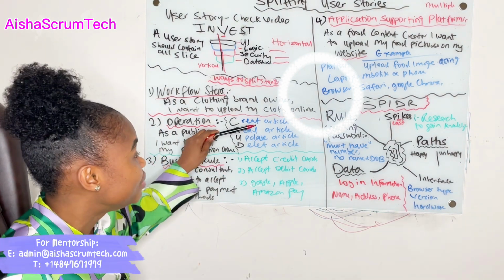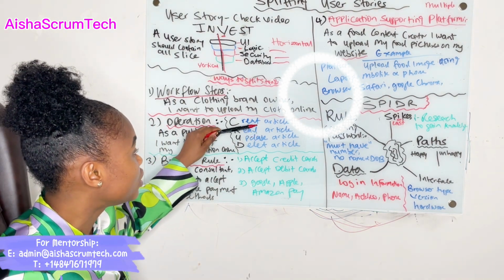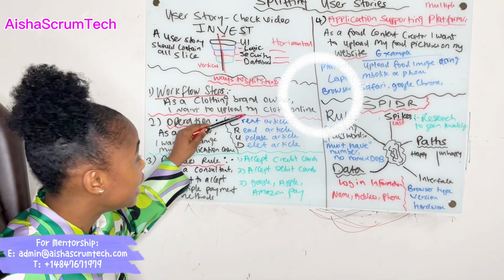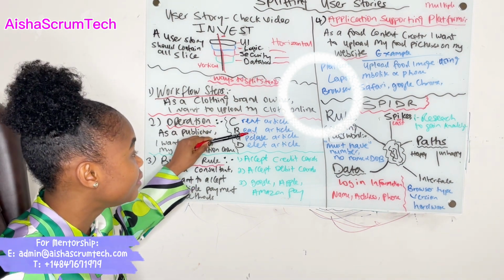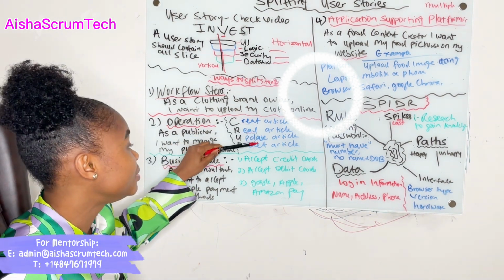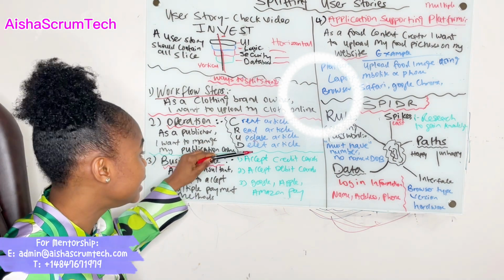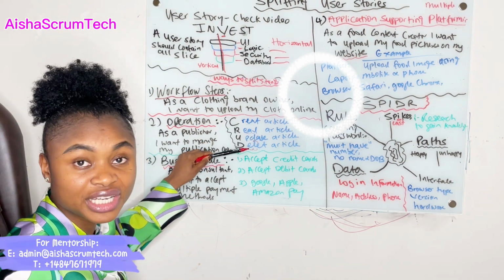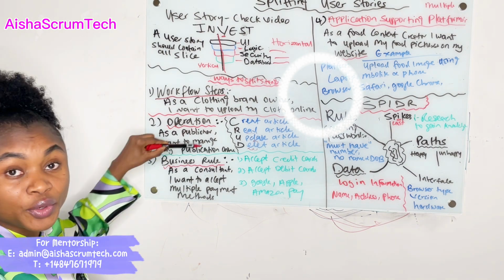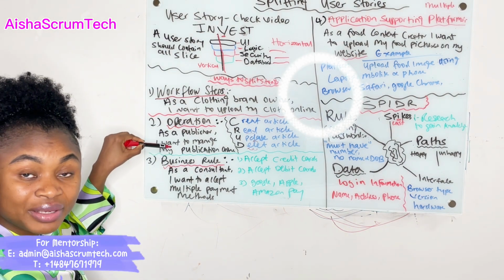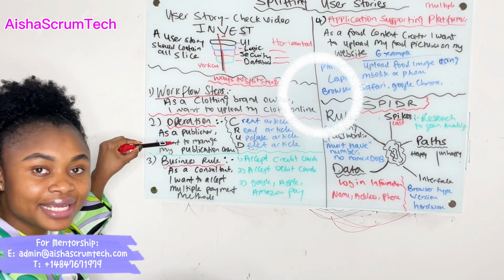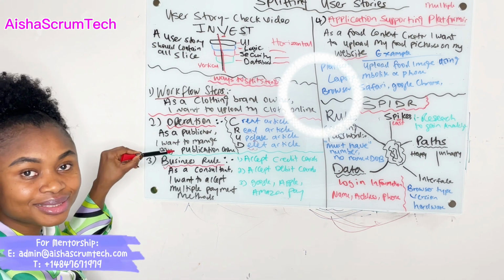So all of this is explained so that we can focus on this in sprint 1. And in sprint 2, we can try to include this functionality. In sprint 3, we can include this functionality. And in sprint 4, we can create this functionality, instead of working on all of this as one big item in a particular sprint, where there is a high likelihood that we might not complete it.